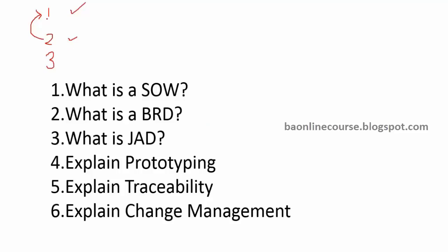Thank you. So if requirement 1 changes and then that impacts requirement 2, this is called horizontal traceability. We are linking them. So we are saying that 2 is dependent on 1. So in horizontal traceability, I'm maintaining that relationship. So I know that if requirement 1 changes, then I have to check requirement 2 also, because 2 is dependent on 1. If 1 changes, 2 also will change. So this is called horizontal traceability.